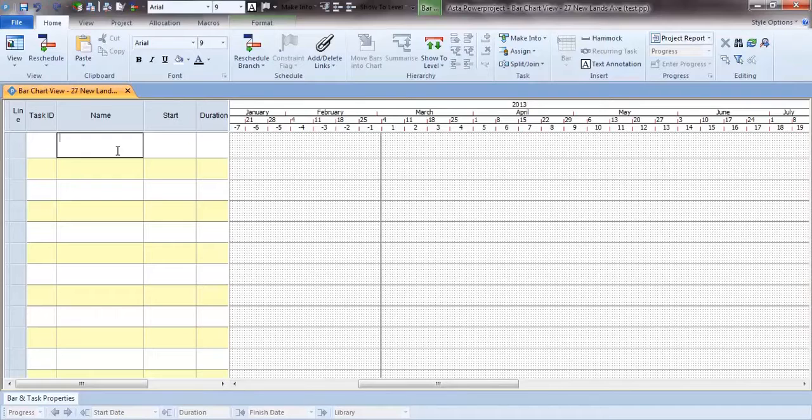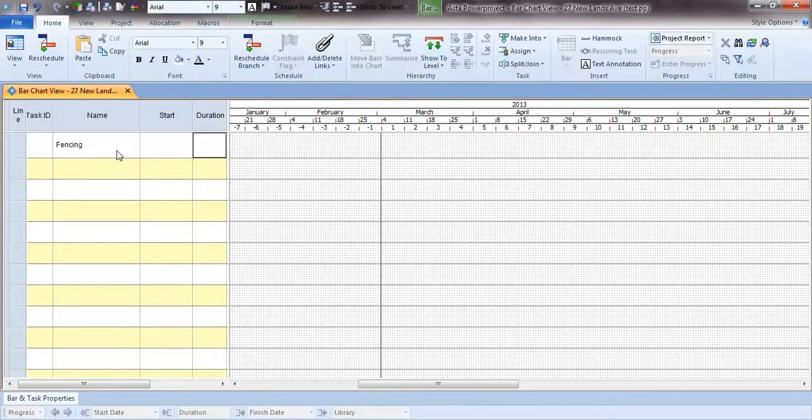The first thing that we're going to do in our project, which is a construction project for this example, is put fencing around the site to make it secure. And I'm going to say how long it's going to take us to carry out this operation. I'm going to base this on a letter and number combination. So we type 6D for 6 days, and then it creates an activity